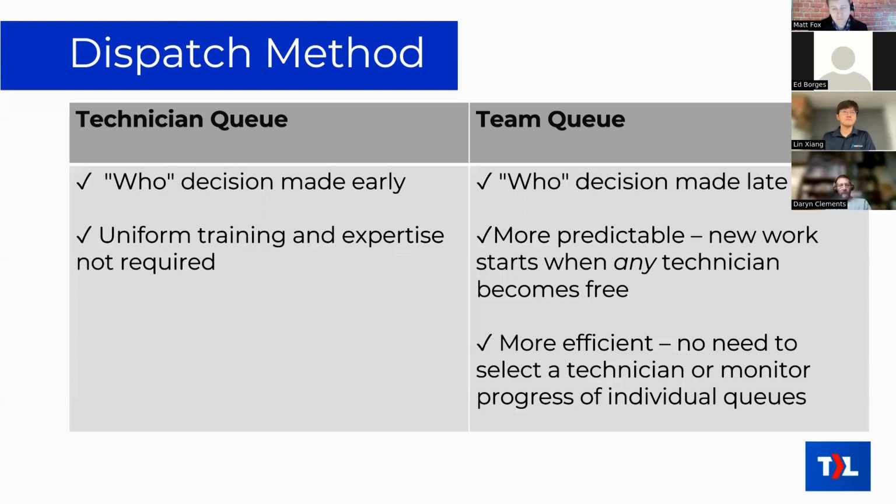That is always a big challenge in a team, just making sure that you've got a decent base level of expertise as new people join your team and other people leave and you lose that expertise. So that is difficult. One way to help manage that is that a hybrid method is possible. That's where you would only assign the work when that particular ticket requires some specialized training or knowledge about a technology or knowledge about a customer.